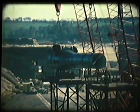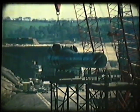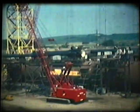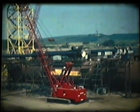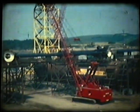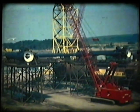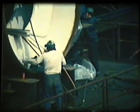May 1973. Assembly of the structure itself commenced in the dock. The first node was lifted into place. In a little over a year, all the rest of the steel to make the structure was to follow. The method was to make up sub-assemblies for the sides of the jacket on trestles set on the dock floor. All fittings, such as the anodes for the cathodic protection system, were placed at this stage.